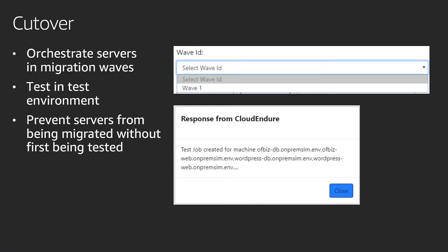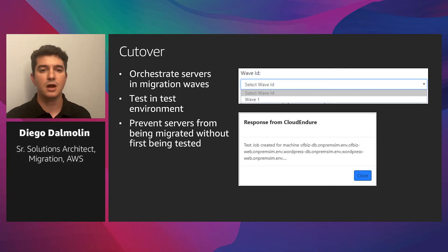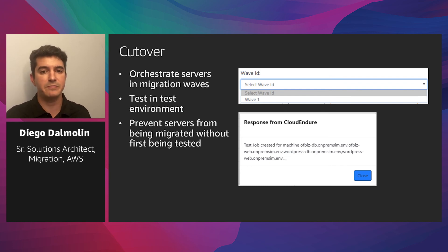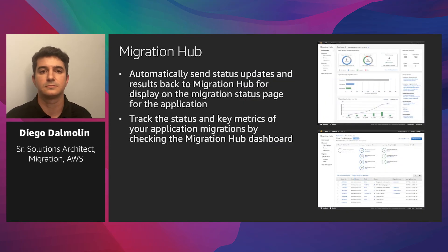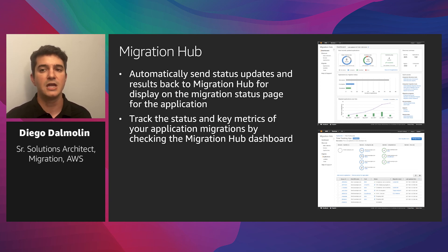As you've already defined the migration waves in the spreadsheet, you can use that information to orchestrate the server cutover. CloudEndure has two migration modes — test and cutover — and they do exactly the same thing. But test mode sets a flag on the server to identify servers that have been tested, and you can use that flag to build guard rails ensuring servers have been tested prior to migrating. CloudEndure and Migration Hub can be integrated — CloudEndure will automatically send status updates to Migration Hub, and you can use that information to keep migration stakeholders up to date with the current status and progress of the migration project.